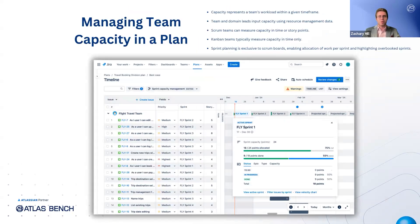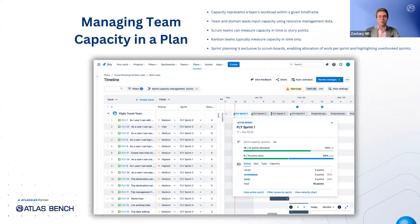Capacity is a key factor in determining what your teams can realistically achieve within a given time. By adding capacity to your plan, team and domain leads can draw on resource management data to gauge each team's availability and workload — especially important when prioritizing projects or deciding when to take on new work. When it comes to measuring capacity, Scrum teams have the option of using time or story points, an estimation technique suited to their time-boxed sprints, while Kanban teams typically measure capacity in units of time only, as they operate with a continuous flow of work. If you're using Scrum boards as an issue source, you'll gain access to sprint planning features, letting you assign work to upcoming sprints and quickly see if you've overloaded a team, ensuring that your plans remain both ambitious and achievable.